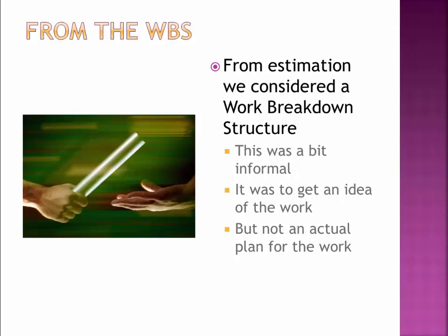point. There's a difference, though, between estimation and a real project. In the estimation phase, we're not doing the project work at that point. We're just trying to size out the project work. So the granularity of what's going to be captured in that is very different than what we would expect when we get to the point of wanting to see an actual project.